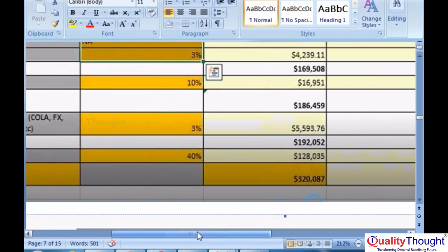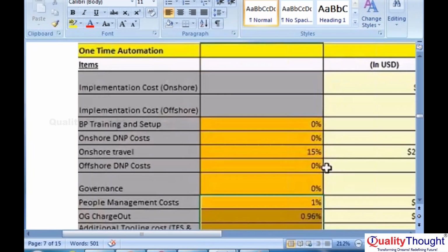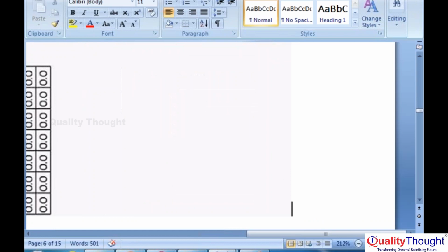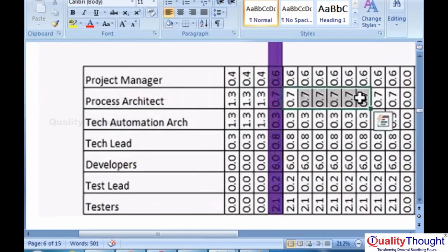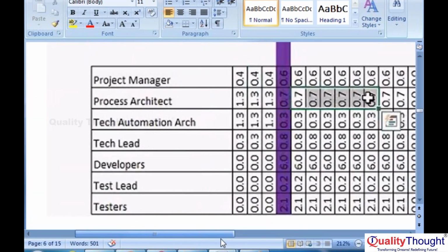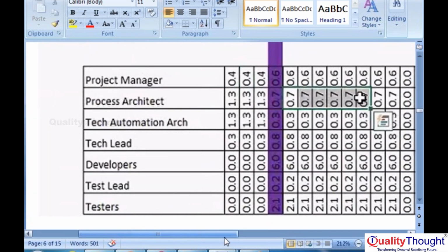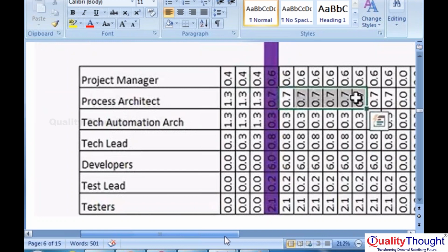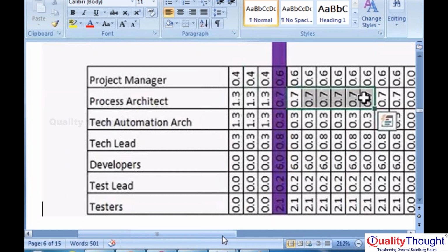Okay, so total project cost will be decided, employees and how many employees are required week wise. If it's a 3 months project, first week how many developers are required, second week, third week, fourth week wise breakdown of the employees. So in the first week how many employees, second week, third week. Even at that level your architects will design, prepare the design.